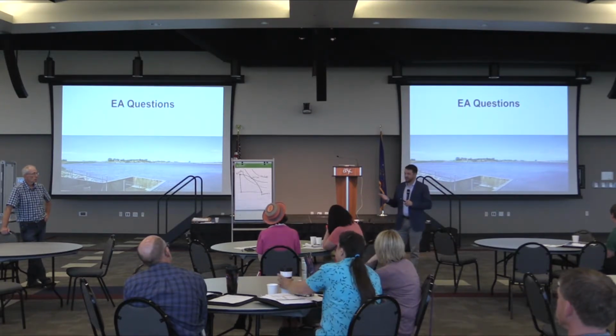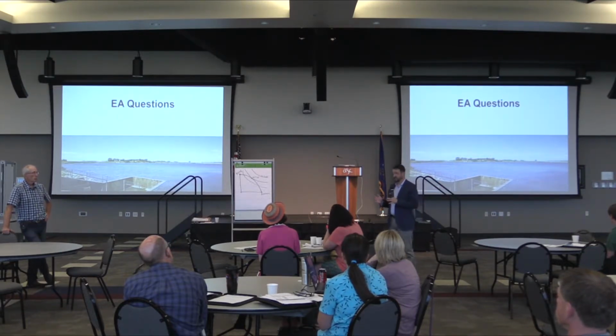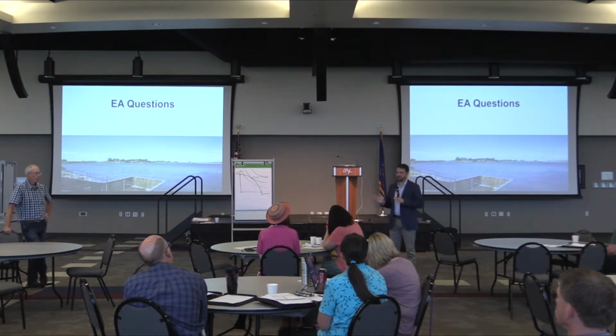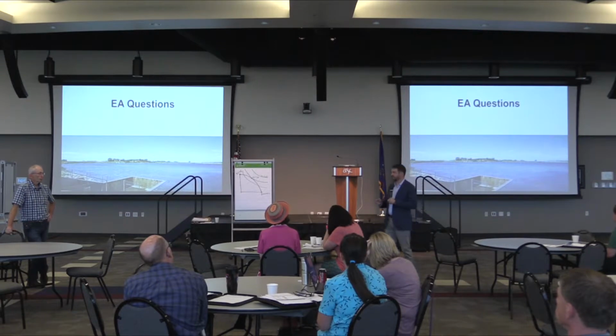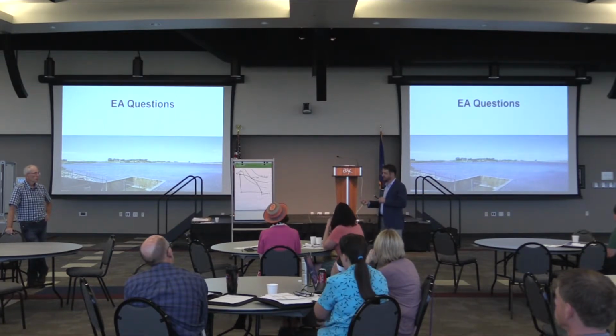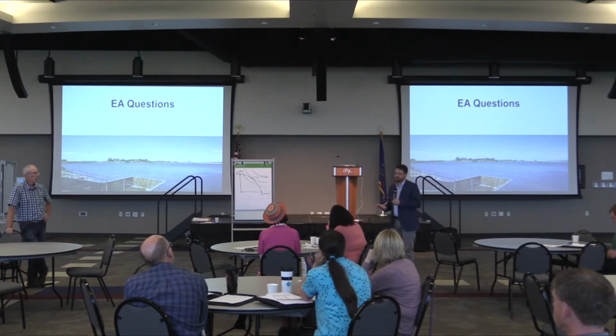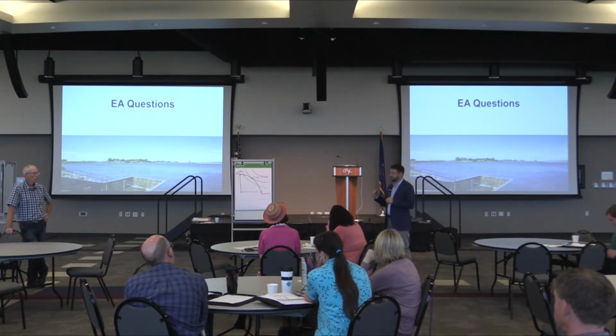But also the issue with using habitat restoration value, which Jay and I talked about in developing this model, is that it's really dependent on scale and quality. If we have a small 1 acre site versus a site that's going to be 100 acres, there's going to be a difference in quality, so we can't put a value in the model that says it's $135 per acre of habitat restoration. That 1 acre site isn't going to have the same quality as 100 acres would. So we decided to whittle it down and just use recreation as a starting point, both consumptive and non-consumptive, and then we have the other benefits.